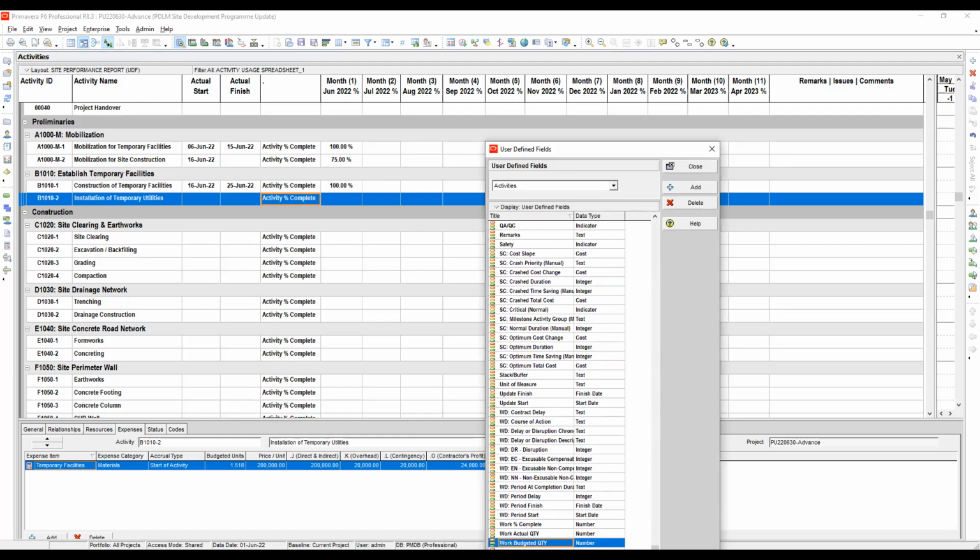So, guys, I just want to explain this to you. I think you already know how to add parameters here when you need them in your schedule. Here, the work budgeted quantity, I already created it and the data type is number. My purpose here is that we can customize the calculation of work percent complete using the Primavera P6 global change feature if we need to.